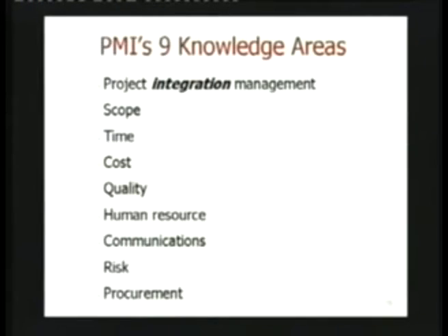What you do is, right off the bat when you're starting the project, you set up these protocols. If there are going to be changes because of the external environment, for example, you already have a risk management plan in place. That spells out what actions are to be taken in case plan A does not work. But if you reach a stage where a large change is to be made, they have to bring in a new crane, or you need a different platform and new software, or you need people with different kinds of skills, there'll be an impact of that.